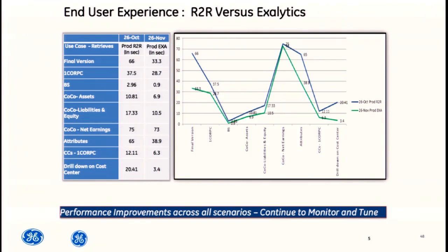And it took a little tweaking. These were cases where we moved it, and the first thing they came back to us was they said it slowed down. And we go in, change a couple things. And some of that wasn't just Exa, though. And that's one of, as I talk later on a little bit about lessons learned, doing a major hardware and software upgrade at the same time introduces some interesting challenges.